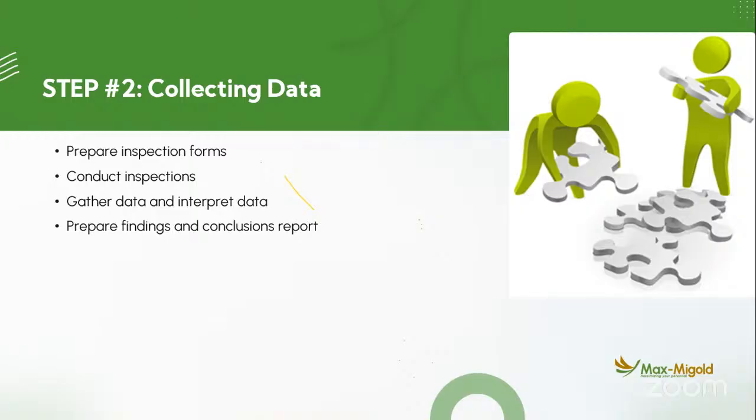So when you do the assessment checklist, you give it to the team. The team does that assessment and put all their findings in the assessment list. And now you take each of the assessment list and see which one do you need to get cost for and which one can you carry out without having cost. Those ones that require cost, you now start inviting your vendors. You send them to that place to go and do what's it called cost estimate. They do their costing, send you their quotation.